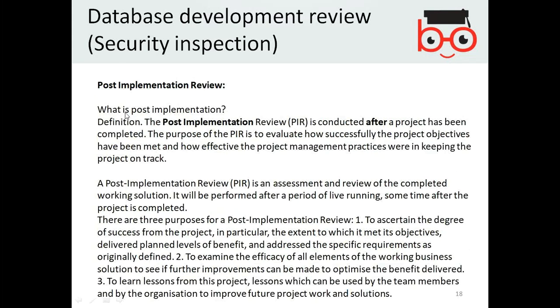Post-implementation review. This review is conducted after a project has been completed. The purpose of post-implementation review is to evaluate how successfully the project objectives have been met and how effective the project management practices were in keeping the project on track. It is basically an assessment and review of the completed work solution. So post-implementation review is the assessment and evaluation. It will be performed after a period of live running, sometime after the project is completed.